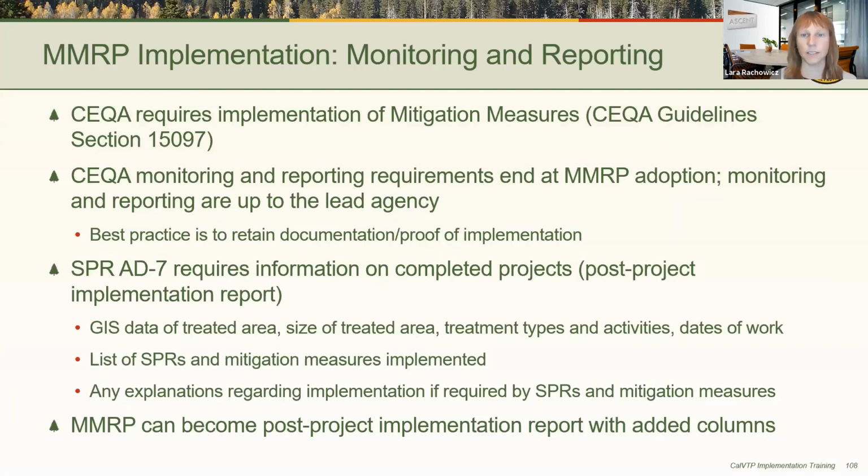CEQA itself has no sanctions built in for a situation where a required mitigation measure is not implemented. Enforcement is up to the lead agency approving the project, or perhaps an agency with another regulatory connection if it is required, such as a lake and stream bed alteration agreement by CDFW. Best practice is to retain documentation for proof that mitigation has been implemented. Specific to the CalVTP,